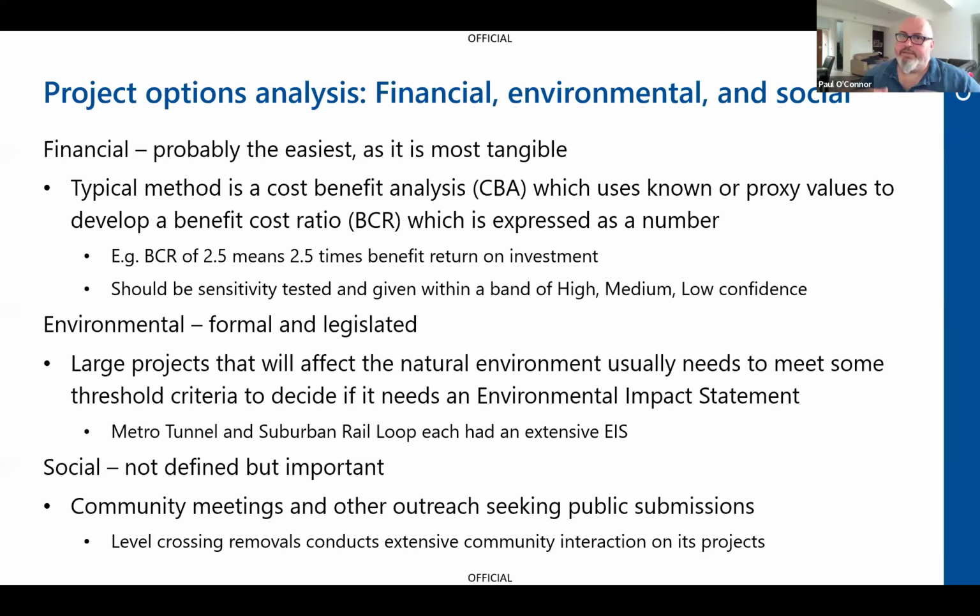And I've seen many, and sometimes they're like literally 175 embedded tabs with cross tabs and formulas. They're extremely complex. But what you're trying to do is allocate those values to what you've observed to develop what's known as a benefit cost ratio, or BCR.